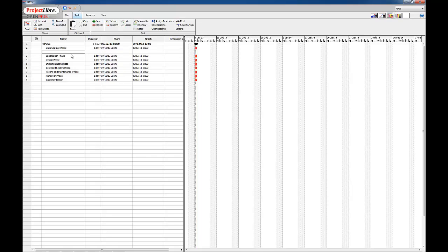So within my data capture phase I'm going to have to contact the client, so that's the first thing I need to do, to find out more about the project. Then, once I have a rough idea what the project is all about, I'm going to create a questionnaire. So my client will be able to liaise with his colleagues and complete the questionnaire.